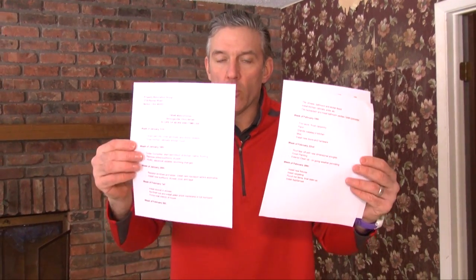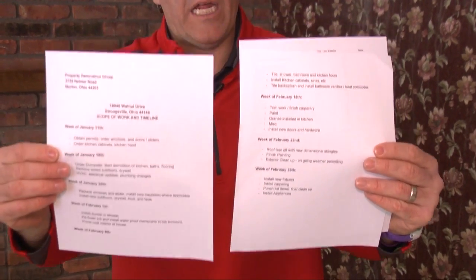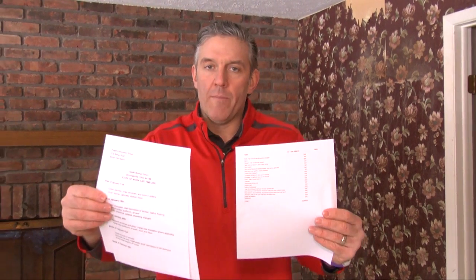And of course, the budget tells you how much you're gonna spend. The 6-step process tells you bam, bam, bam, what's gonna happen in a big picture, high level. And then finally, your detailed schedule and scope of work is what's gonna tell you exactly what's gonna get done each and every week, okay? Never, never, never start a project without these important documents and without these 3 important steps: budget, schedule, and scope of work. If you get these done, it's really hard to screw up a deal. You can make sure that you're always on time and always on budget.